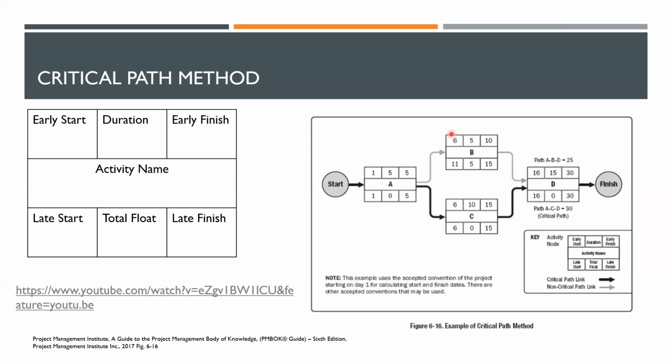Next Monday. On Monday, what time? 8:30. 8:30, yes. So that is the 6th day, right? As you can see here, this was finished on the 5th day, that was Friday at 5:30. On the 6th day is the earliest you can start activity B. And same thing for C, right? Both are on the 6th day.